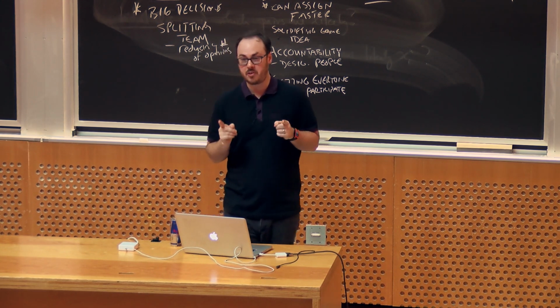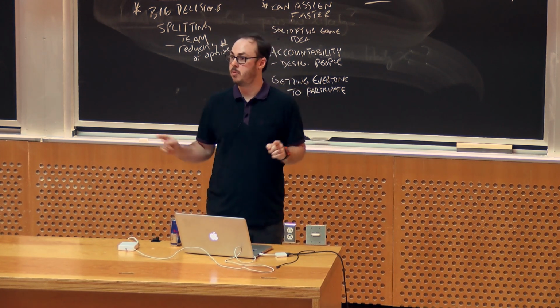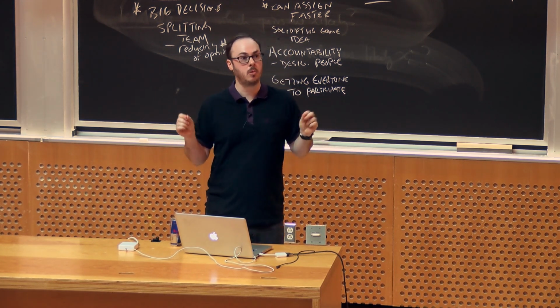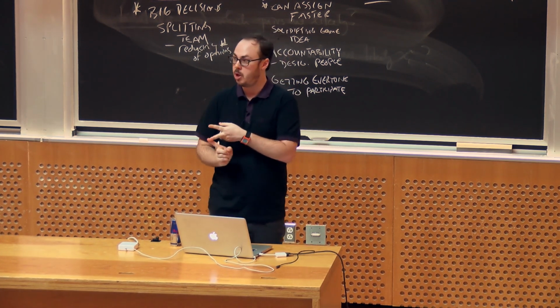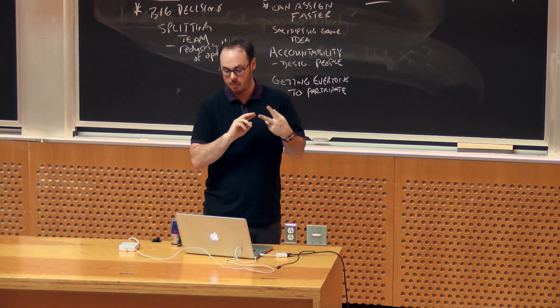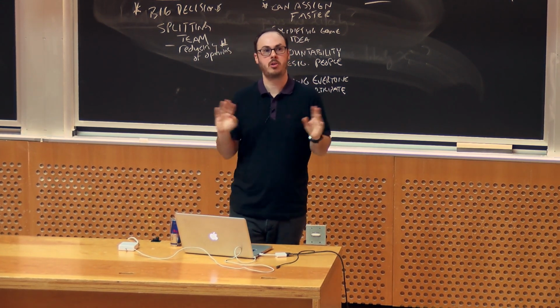Make sure the meeting is focused on talking about your processes. So don't talk about your game. Don't talk about the work that you've done. Talk about how you organize yourself. And in particular, talk about your interpersonal matters. Talk about, basically, communicating about communicating. So talk about how you are talking to each other.